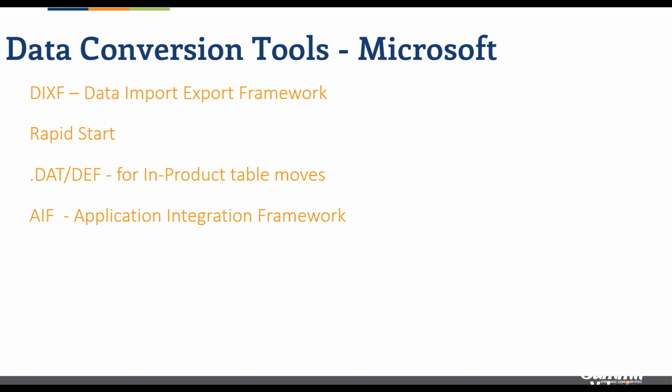If it's worthy of data conversion rather than just manual entry, we'll bring over open purchase orders, sales orders, AP and AR, those types of things. So it really depends on the size of the company and if we can kind of turn those off. In GP, if you only have, say, 5 open purchase orders, then we would just manually enter them. If you have 5,000, then obviously we're going to do some data conversion there. So the scope of how much data gets converted or what type of data really depends on how many records you have.